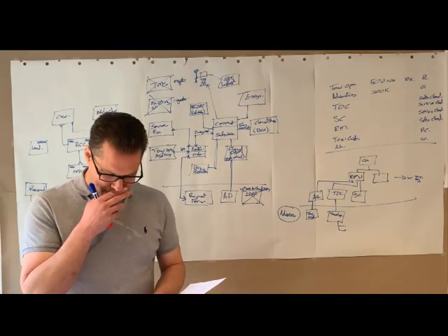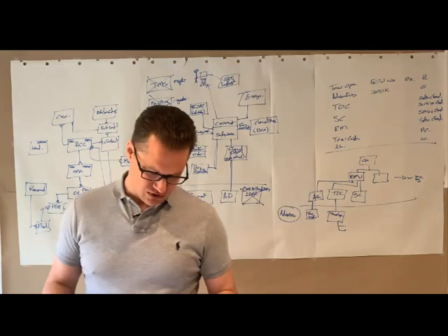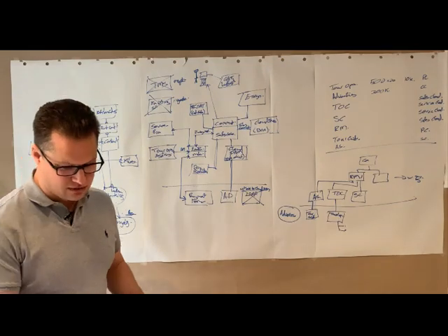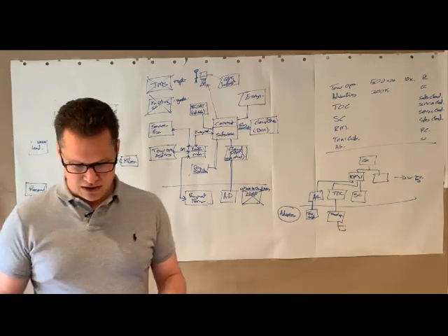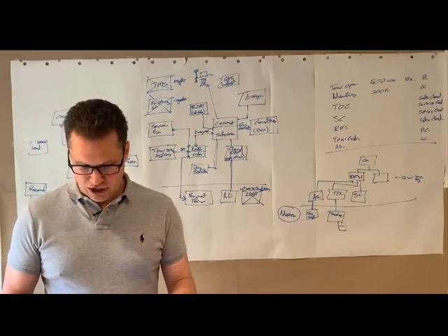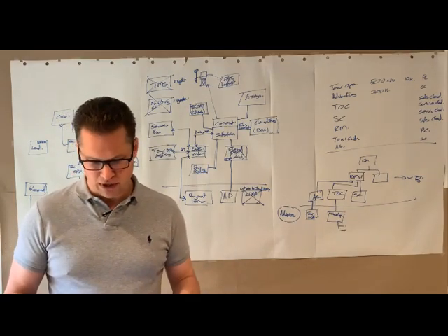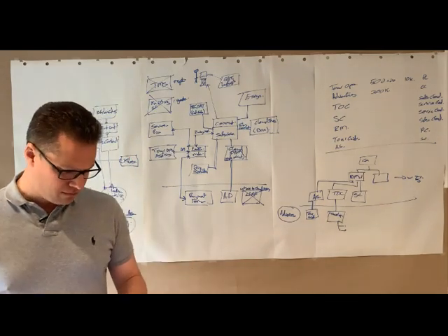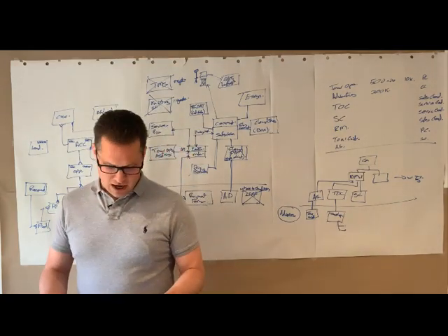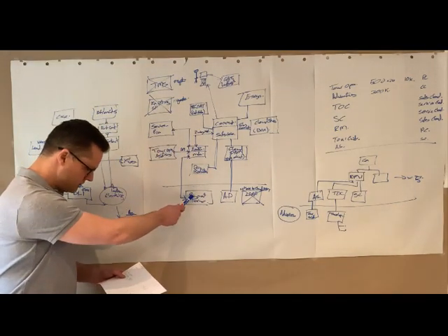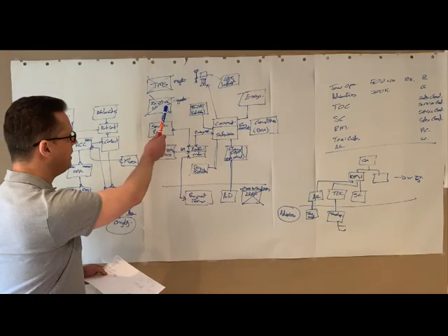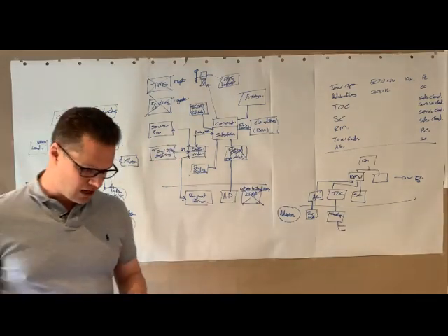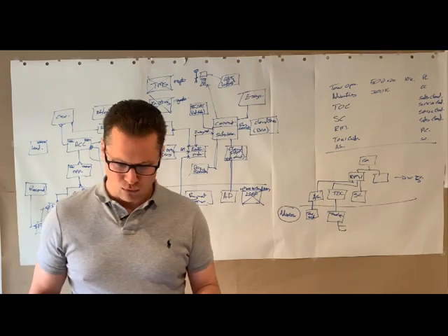We've also got the different streams of work that we need to do. So the Salesforce build itself, in terms of addressing the majority of these business requirements, that could be conducted in an agile manner, in collaboration with the different stakeholders to prioritize. However, when it comes to the data migration, the integration with Paymentforce, and also the Sales Cloud migration, so the existing Salesforce orgs that we're going to get rid of, I would see these be separate work streams that would run in a waterfall manner.